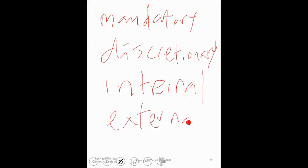Mandatory. What's another name for mandatory? Hard logic. What's another name for discretionary? Soft logic or preferred logic. So you could have a task or you could have a relationship that is, that is mandatory. You could have a dependency rather that's mandatory and internal or mandatory and external or discretionary and internal or discretionary and external. Just know that. Read it up in a PMBOK guide. Those are big. Important. Good for you to know.